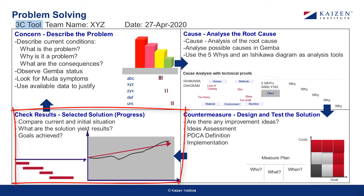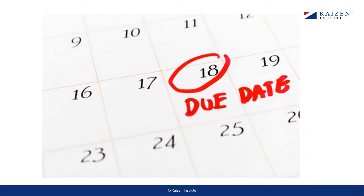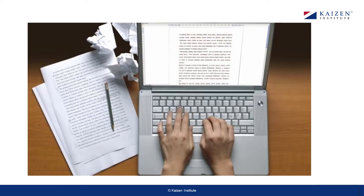The check results column comprises comparing the current and initial conditions and documenting the improvement. The check results section also covers solution yield results and the goals achieved. Once the countermeasure has been selected and implemented, you have to keep checking the results. The checking of results can be done by the whole team or an individual. A person from a team can be selected as the problem owner who keeps track of the results. Select a realistic due date to close the documented problem.